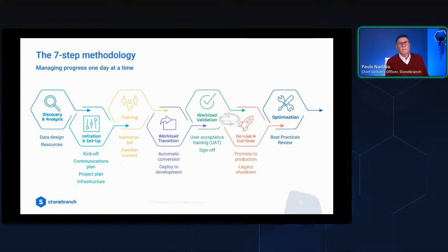Once that is set up, we go into training. So training is somewhat of a floating activity during this process. We can delay training somewhat, but we want you to be familiar with the tool and how to operate it before we deliver the transition into your environment. So there is some flexibility, but it needs to be done before the transition is finished.